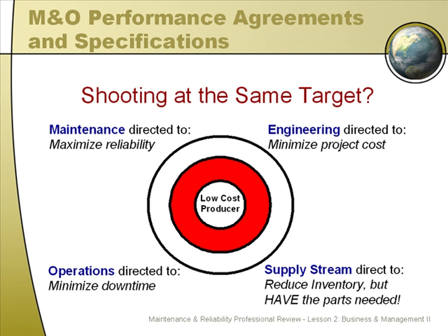How does the engineering department play into this same scenario? Well, in general, the engineering department may not be looking at life cycle cost, but instead installed cost, because it's the only part of the picture that they totally control. In other words, if they can purchase a piece of equipment that will produce as intended per the direction of the project, and they can buy it at a low cost, they will tend to choose the low cost option because it's the only thing that they control and the only thing that they're measured by.